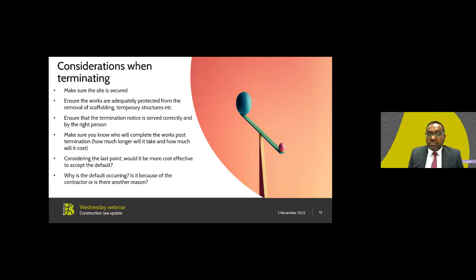You should also look at the minimum period of notice required under the contract. The notice should identify clearly the length of the notice or its end date. The notice should also be unequivocal. It must either affirm the whole of the contract or rescind the whole contract. You cannot approbate or reprobate by affirming part of the contract and disaffirming the rest.